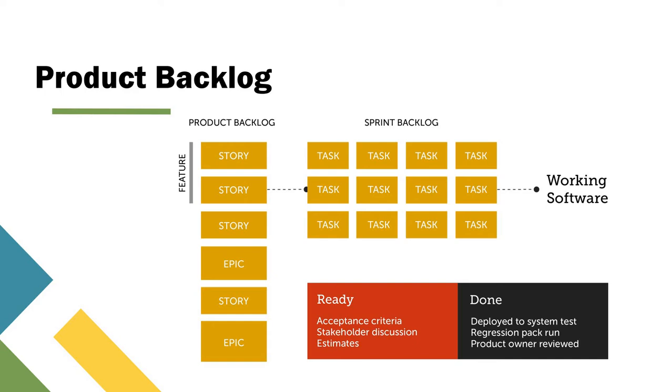The product backlog lists all features, functions, requirements, fixes, and enhancements that constitute the changes to be made to the product in future releases. The product backlog items have the attributes of description, order, estimate, and value, which will be discussed in the next session. The items are normally termed as user stories.